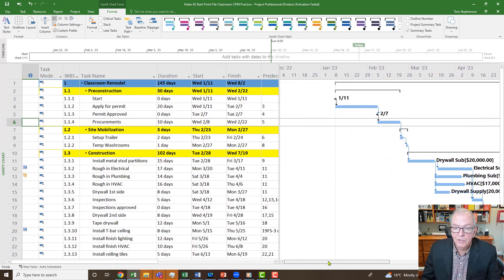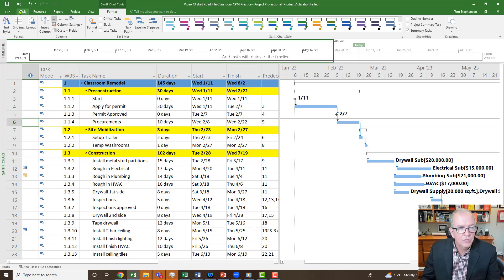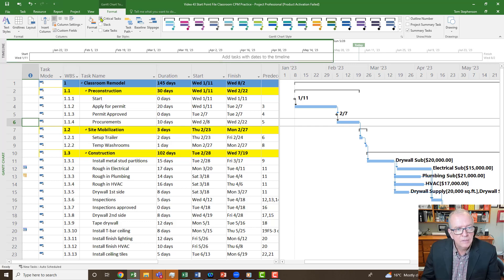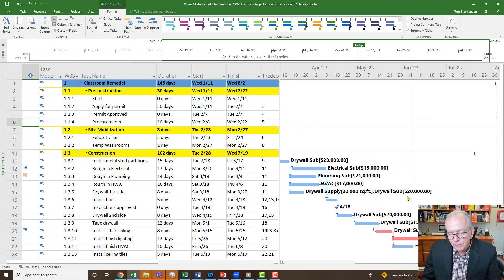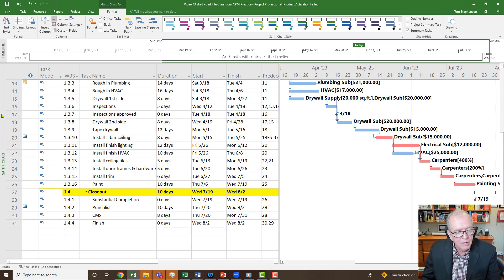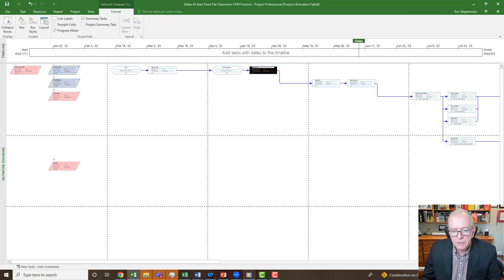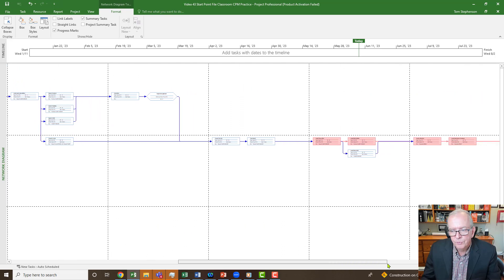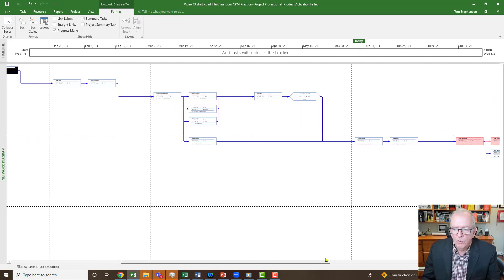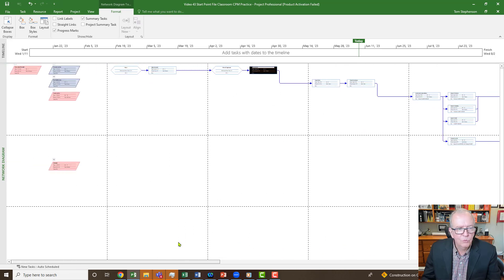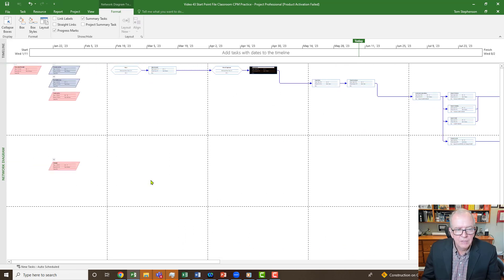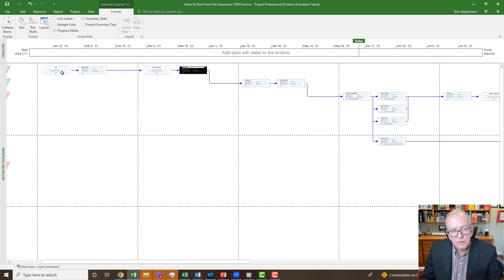The first thing to check: have I got critical path turned on? I should go to the Format tab and click on Critical Tasks. Now I still don't see it from the beginning, but I do see it partway through — pretty much what I saw in the network diagram where it was turning red partway through. So the question is, why can I only see a little bit of the critical path? What happened to the rest of it?